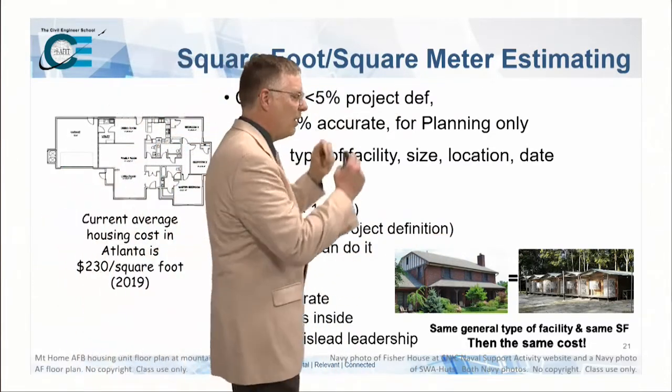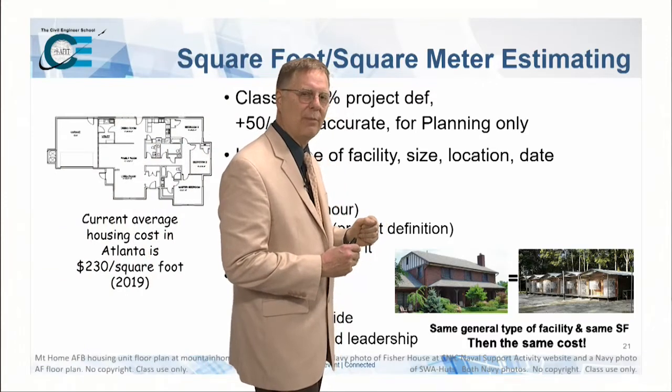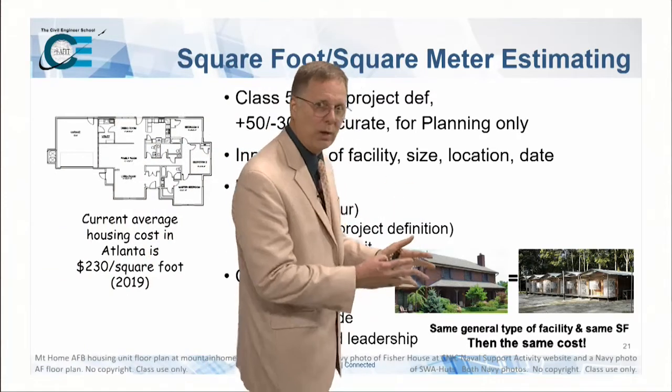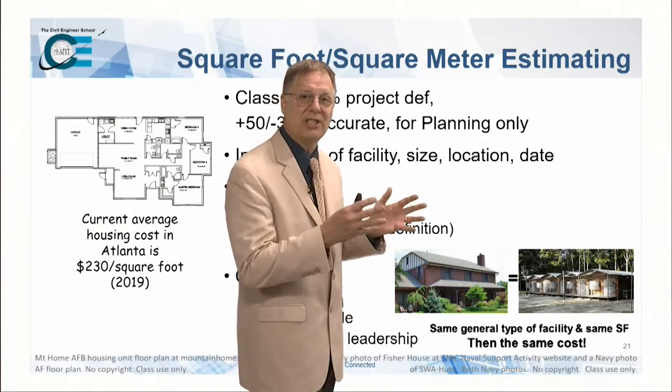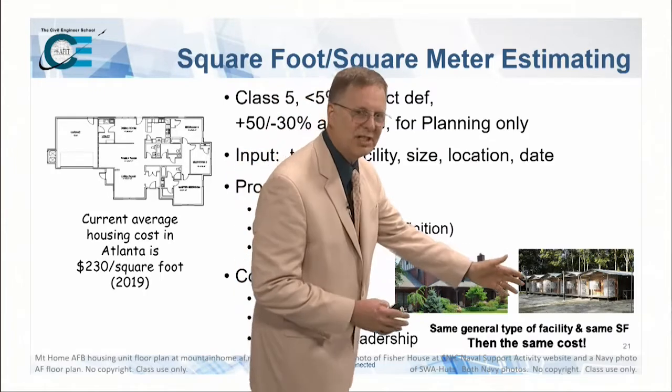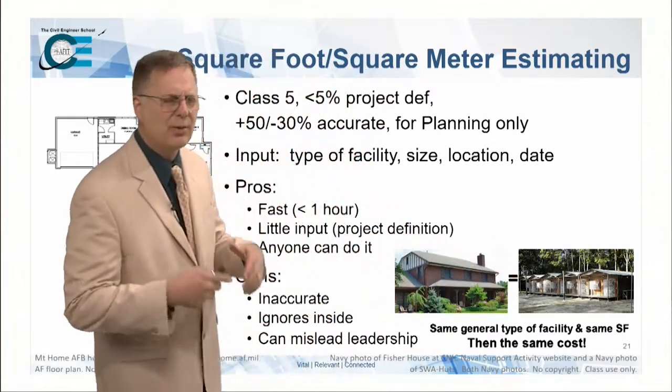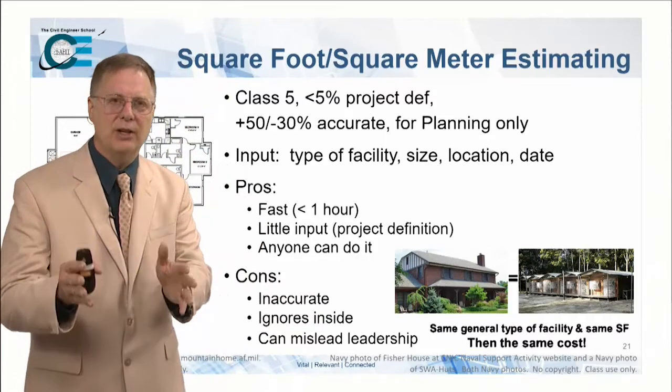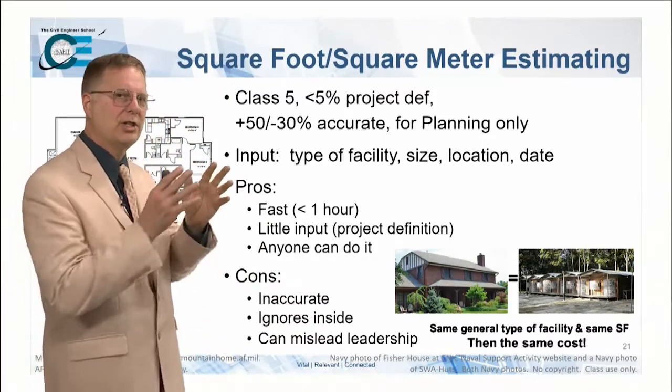But because the square meter estimating method does not care what goes on inside of it, all it cares is what the size of it is, it would give you the same price for both. And so that's the challenge. I just want you to be aware of the challenges of this method.